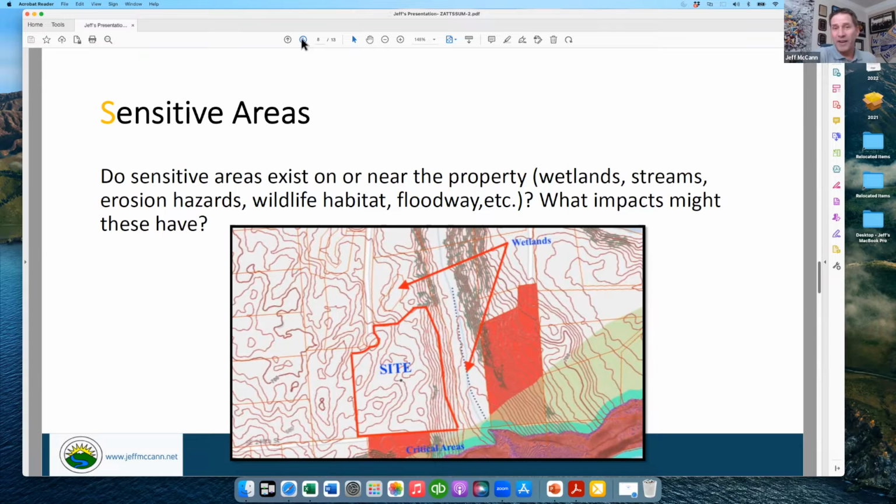We don't have to deal with it in King County, but the western pocket gopher is kind of like, I like to say, kind of like the spotted owl was to the timber people back in the 80s. I dealt with properties there, and every mole hole, or not mole, but pocket gopher hole we found, we had to put a radius around it. We couldn't build. And you have to do studies at certain times of the year.